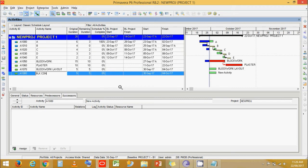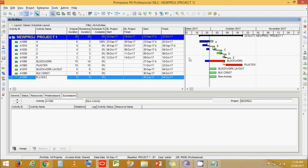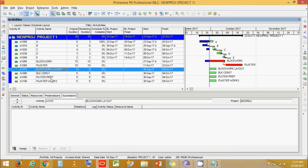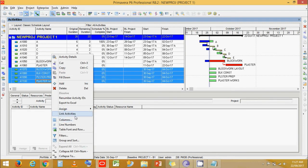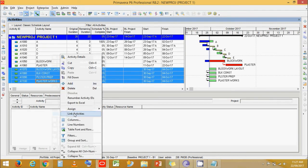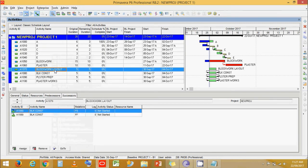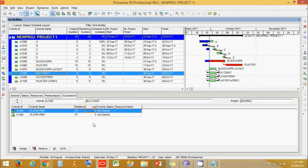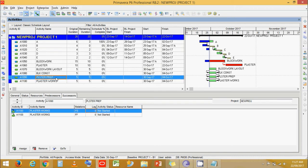Another solution is to break down activities into multiple activities. Instead of just 'Block Work', use: Block Work Layout, Block Work Construction. Instead of just 'Plaster', use: Plaster Preparation and Plaster Works. Now let's link these activities and add some lag.